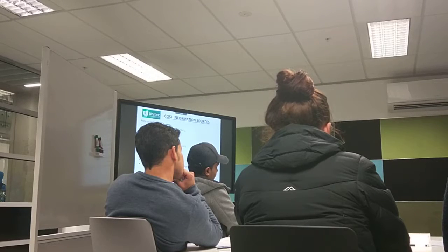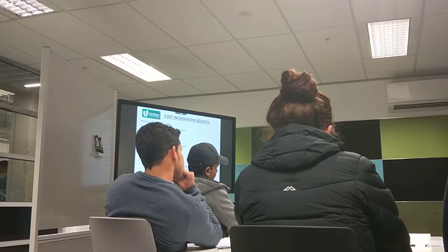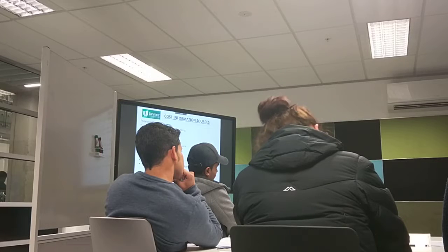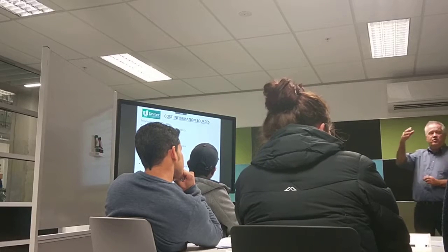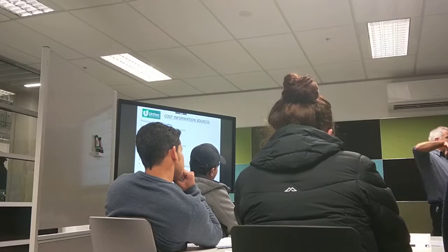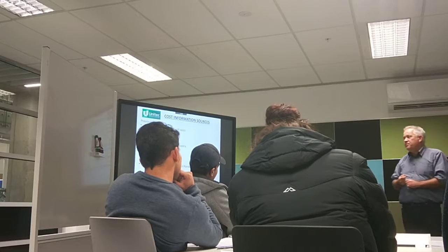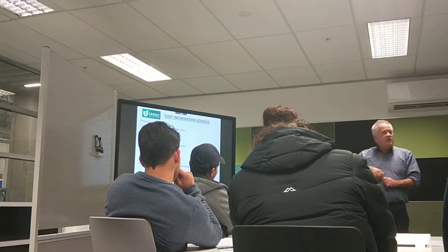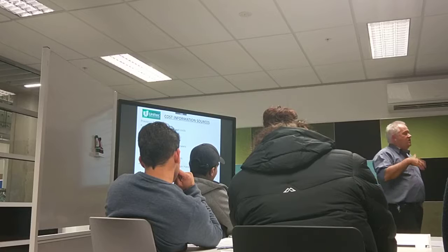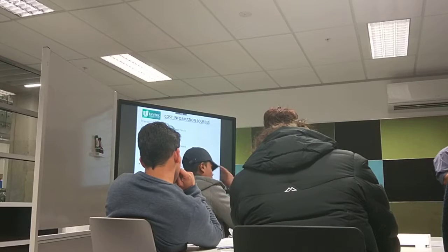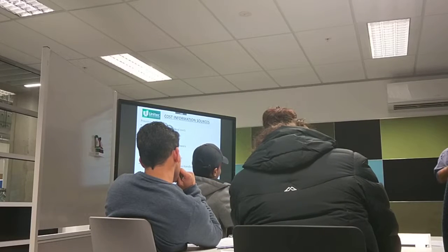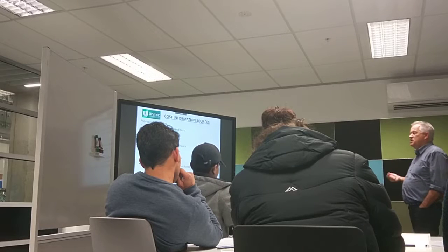How much is the labour cost for this much time? Much the same way that you did when you were doing your cost estimates for your first project. So you just work up a price, and then you divide it by the quantity, and that would be the rate you put in. So your own experienced workers can tell you time and resources, and from that, you know how much the resources are per hour, so you can figure out how much it is.